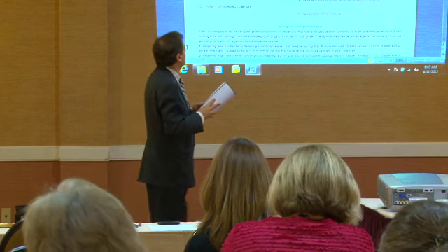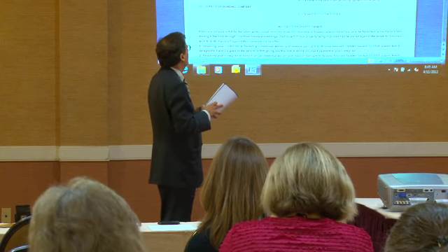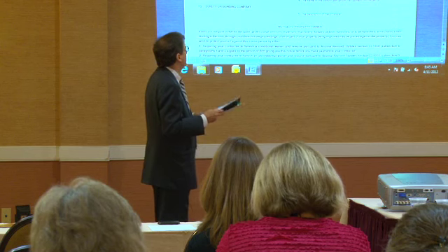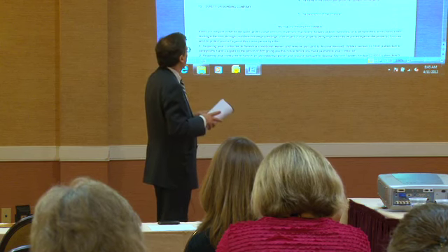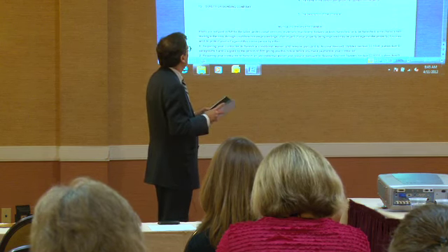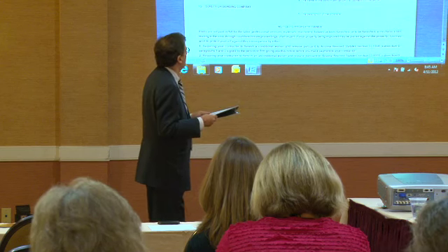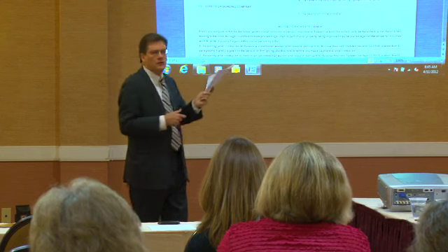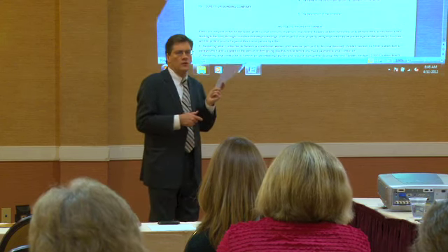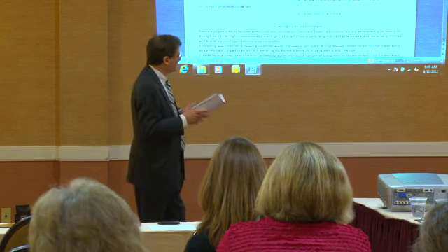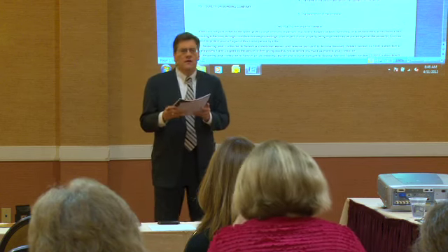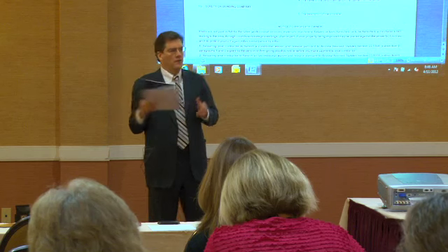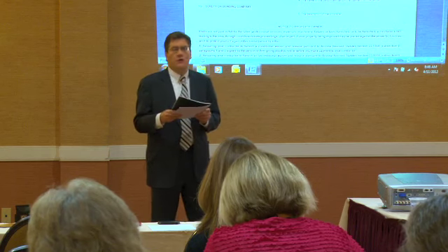Right side of the page. You're hereby notified that the undersigned claimant has furnished or will furnish labor, materials, machinery, fixtures, tools of the following general description. This one had concrete in it. An estimate of the total price of the labor, professional service, material, tools furnished or to be furnished is. Now, this is not necessarily the entire size of your contract to this project. If you're a subcontractor, you're going to have a price for the entire portion of your supply of labor and materials. If you're a material supplier, you're not going to.